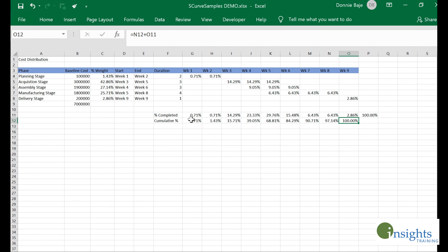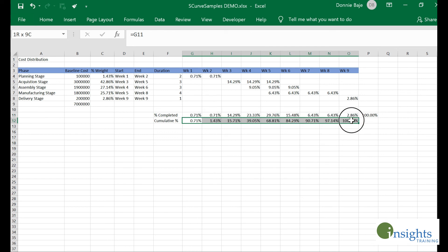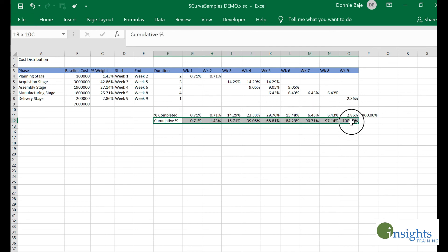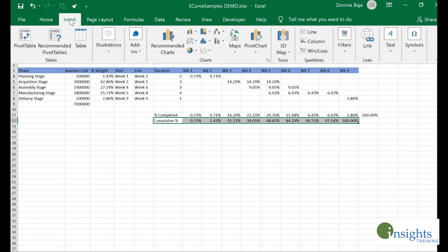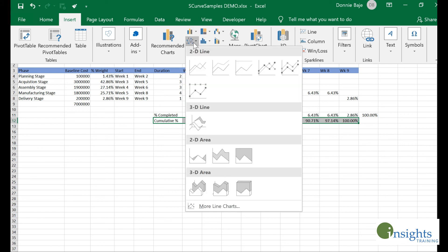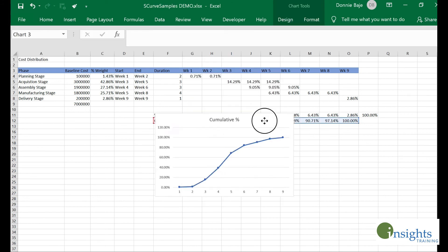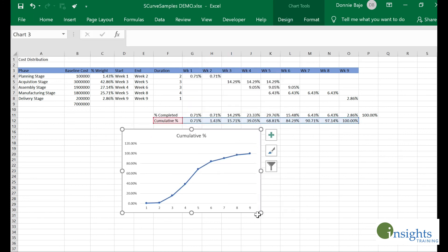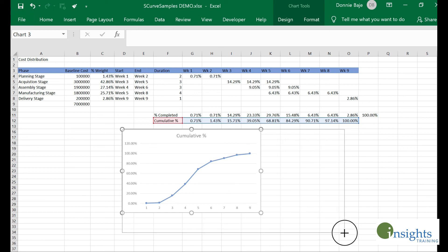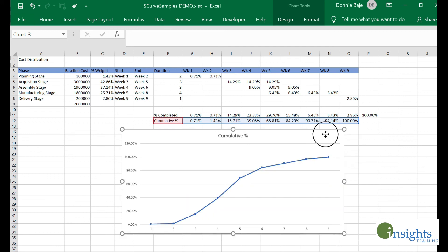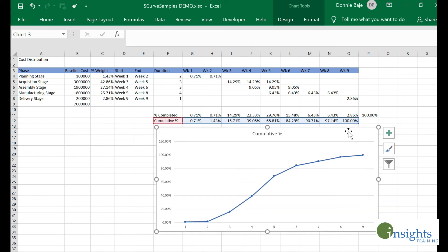The S-curve is actually this line over here. I could highlight the cumulative percentage, insert a line chart, and our S-curve is now created.